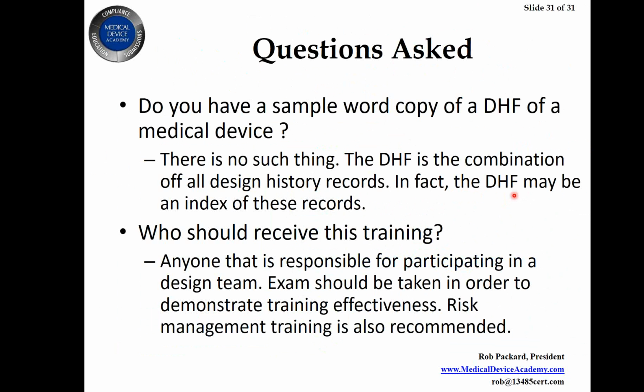You might not have any new hazards to identify, so you might just skip all the way to the design outputs, where all we're going to do is change, let's say, one of the electrical components because it became obsolete. They don't have a leaded version anymore, and now it's RoHS compliant, so we have to make that kind of change. Maybe they obsoleted a screen. Maybe we're making it bigger. Maybe we added Bluetooth. Those would be examples of minor design changes that you might just have a very abbreviated project for.